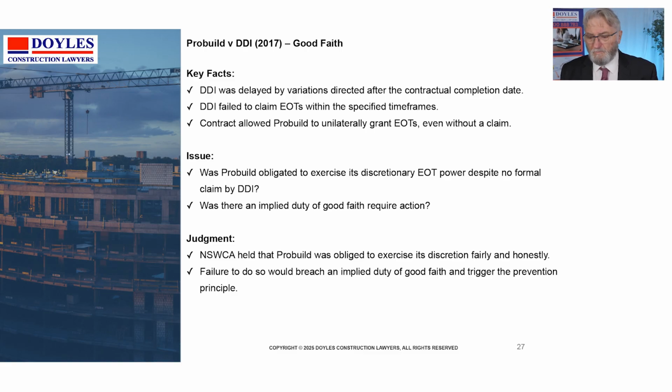So DDI had some weights against them in trying to secure some remedies based on the good faith obligation of ProBuild. But the New South Wales Court of Appeal held that it was obliged to exercise its discretion, given that it had known why DDI was delayed, in the sense that they had issued the variations. They knew all about the delay, they knew all about the reason for it, and the benefit they obtained from it. The court held that the failure to do so would breach an implied duty of good faith, and they should allow a remedy to DDI.